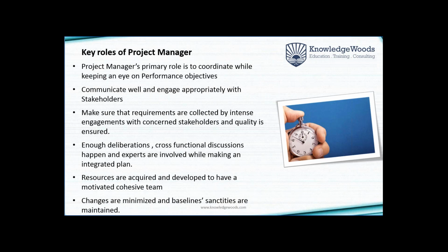Changes are minimized. In the waterfall method of project management, unnecessary changes, mark the word unnecessary once again, which could have been avoided, need to be avoided. However, if a change is essential and required in the interest of the project objectives, let it be. But then changes have to go through a change control board.